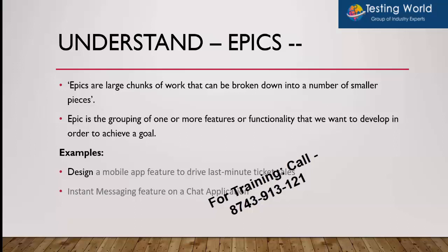Okay, let's take an example. Say you need to develop a messaging feature in your application. The messaging feature can have many different tasks. One, you need to develop simple text messages. You need to develop media transfer. You need to develop different emojis. You need to develop schedule transfer. So there are a lot of tasks which we need to perform in this messaging feature. So the instant messaging feature would be an epic, and further you develop it into smaller tasks, smaller pieces, that is